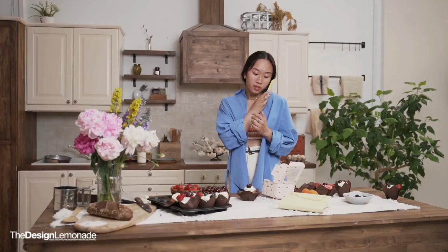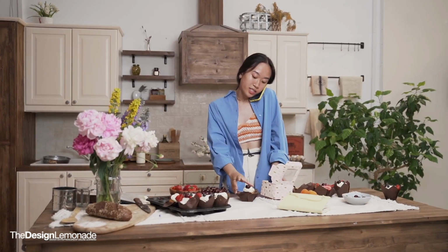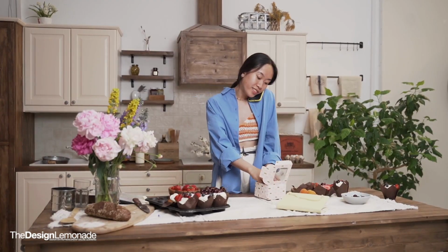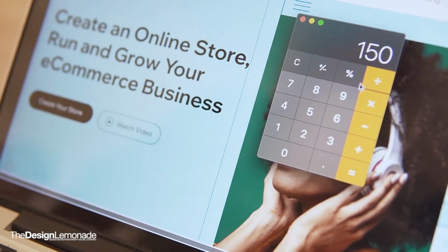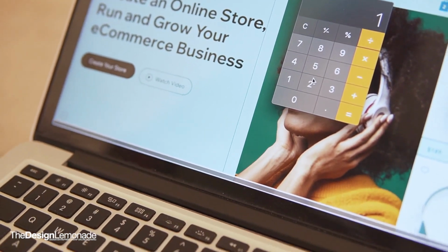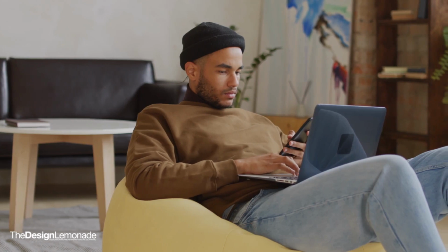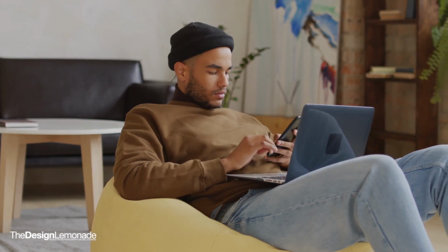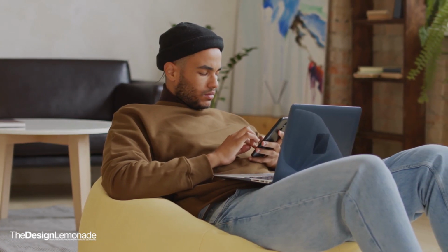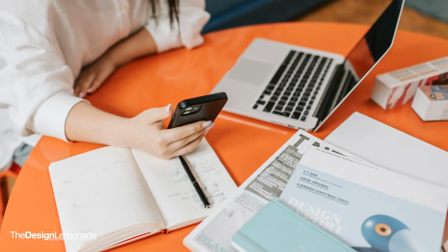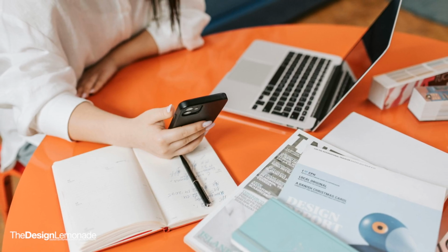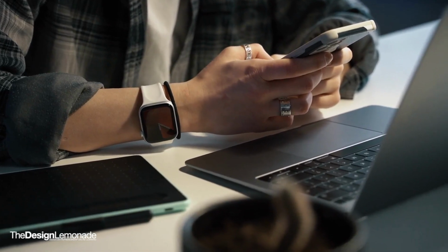Imagine a potential client asks you during an initial call, "Hey, roughly how much would a 5-page website for my new bakery cost?" You can recall a similar 5-page site you built for a local cafe last year, which took you a certain number of hours, and you charged a set amount. You can then confidently provide an estimated range, making you look knowledgeable and prepared without committing to a final price just yet. Of course, this method has its pros and cons. The biggest advantage is speed.